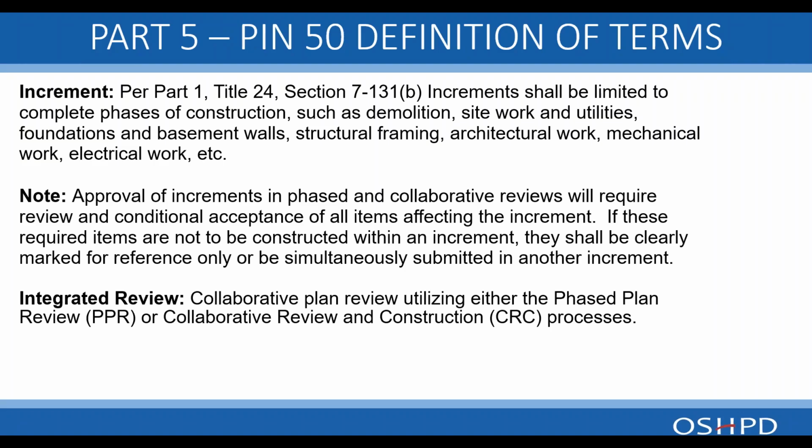In other words, we can't approve an increment that has work shown in it that is incomplete, for example, or not going to be part of that increment. We also need all the parts that complete that increment in order to approve it.